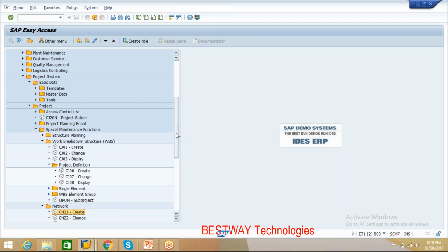Now these project departments have to interact with multiple departments. Which are those departments? They have to have resources, so the HR department. They require materials, so they need to interact with the procurement team, where they give the requirements, delivery, all the necessary information, material specs, and procurement provides the material. That is the main one. Then this material is going to be stored, so you need an interaction with the warehouse or inventory team.